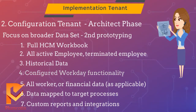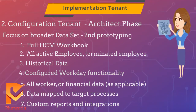Configuration Tenant data includes: 1. Full HCM workbook. 2. All active and terminated employees. 3. Historical data. 4. Configured Workday functionality, for example absence, benefits, customer accounts, and procurement. Unit tested to review and test each individual configuration component to ensure each unit performs its assigned function independently. 5. After unit testing, all worker or financial data is loaded. 6. Data mapped to target processes, functionality confirmed, and detailed data conversion and validation documentation created. 7. Custom reports and integrations are completed and unit tested. Test plans and scenarios, including objectives, expectations, and entrance and exit criteria, are developed and communicated.